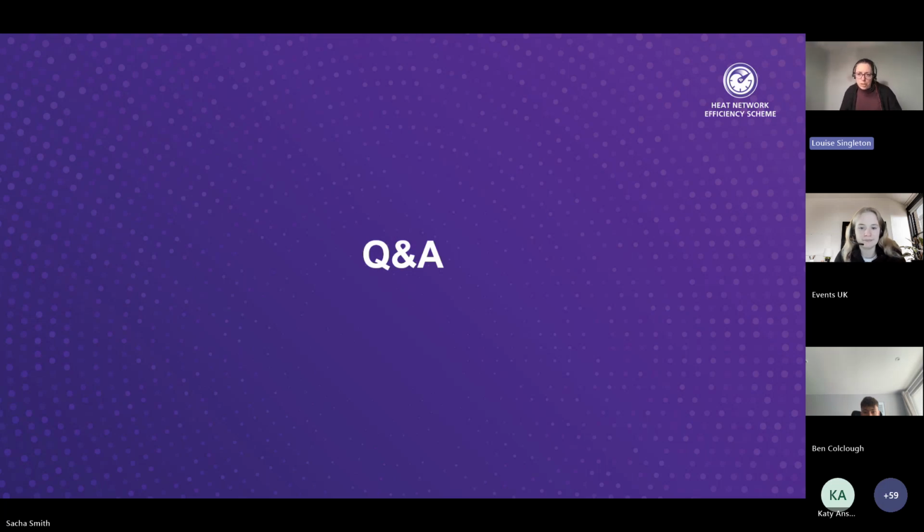Rosie's question: do you require procurement to follow public contract regulations? We don't specify how you must undertake your procurement. That is for your organisation. You should follow your own procurement rules. Obviously, best practice is to receive 3 quotes where possible. We appreciate that some organisations have frameworks or contracts, maintenance contracts, for example, in place already with organisations, so they wouldn't necessarily go through a procurement.